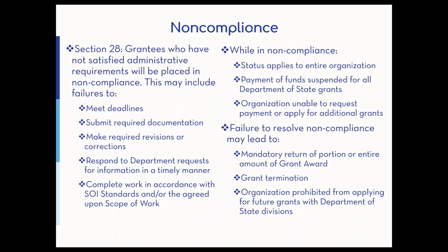So I try not to put folks in non-compliance, but unfortunately, sometimes it happens. If you haven't fulfilled a requirement, you will be placed in non-compliance. So if you haven't submitted your reports on time, if you don't respond to department requests for information in a timely manner, when you are in non-compliance, it's for the entire organization.